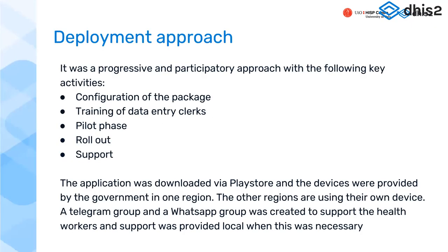So what we were able to do was first of all, to configure the package with the Ministry of Health. And then we were able to train them on data entry. We trained the ones that are supposed to enter the data. There was a pilot phase in the capital city to see how it would go. And it went well, so we finally wanted to roll it out. Of course, they had a lot of support, because we had a lot of DHIS2 users in the country that could support from the Ministry of Health, support from us. What we did was, of course, we downloaded the application on Play Store.